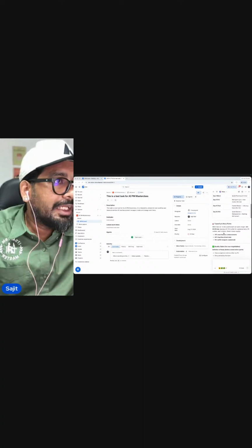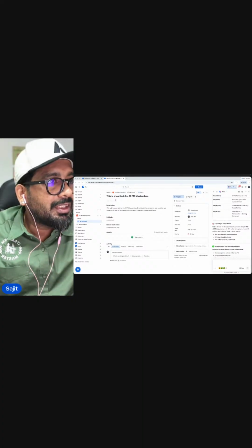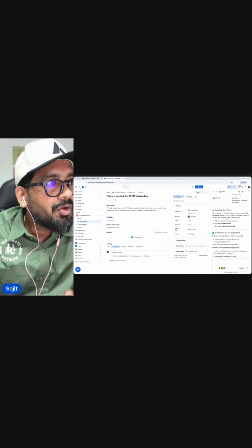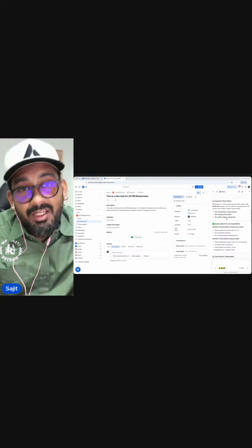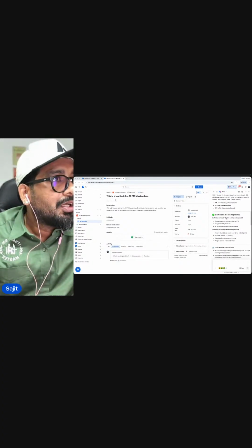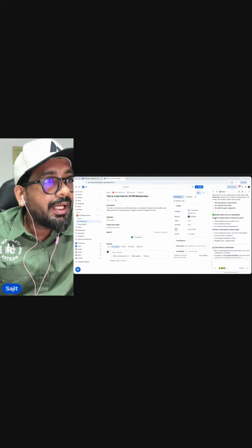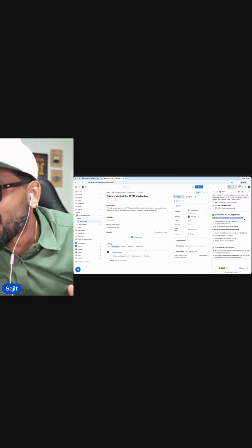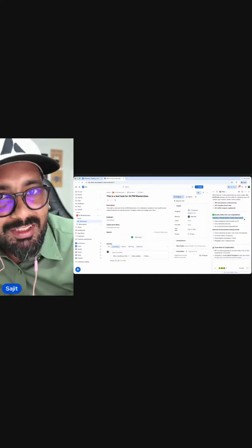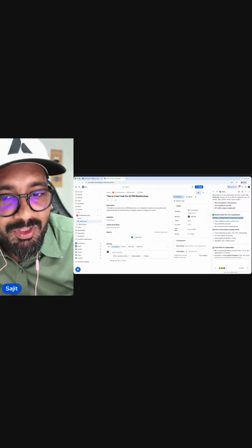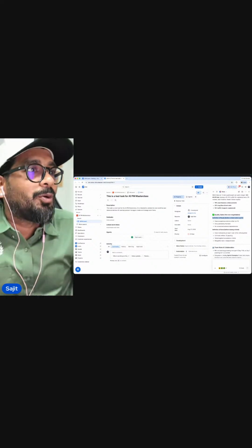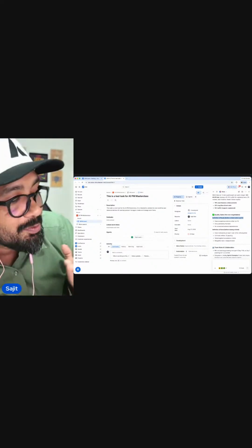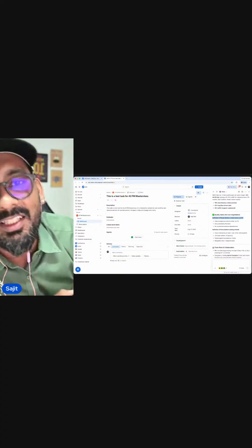It tells you a little bit about capacity and story points, saying if it's 6 devs, you're probably somewhere around this many story points, leaving a 10 to 15% buffer. Again, it's telling you about buffer. It can tell you about the quality gates that you should have, your definition of ready. I've spent countless hours coaching PMs about how their definition of ready and definition of done is more important than any other document.